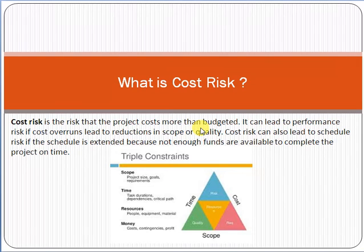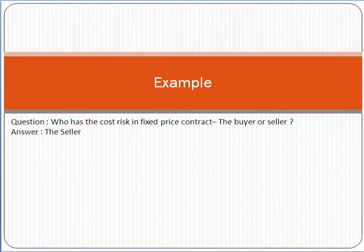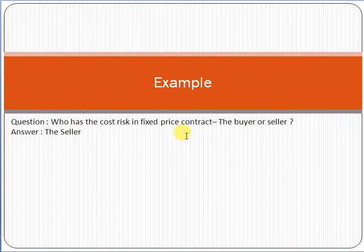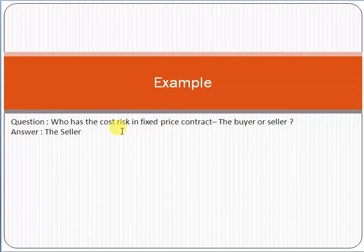Let me give you a very simple example — a very popular question in the Project Management Body of Knowledge and the Rita Mulcahy book: who has the cost risk in a fixed price contract — the buyer or the seller? The answer is the seller. This is also a tip: you may see this question in the PMP exam. Who has the cost risk in a fixed price contract? The answer is the seller.